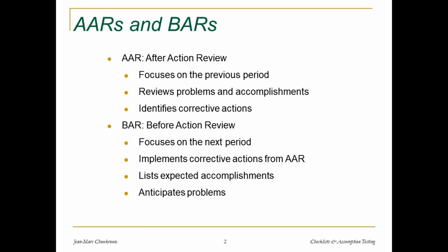The before action review is something that we've developed for projects, which is essentially very similar to the after action review, but it's something you do ahead of time. In other words, before you take action, try to anticipate what might happen and what we might do in order to deal with those anticipated problems before they occur.